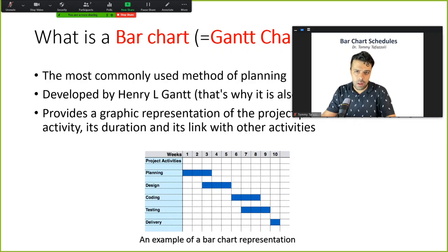A lot of work needs to get done in a very limited space. Each activity or many activities need their own pieces of equipment, and you cannot have a lot of equipment at the same location. So knowing what activities need to get done concurrently can provide you with some insights into how crowded your job site is going to be.